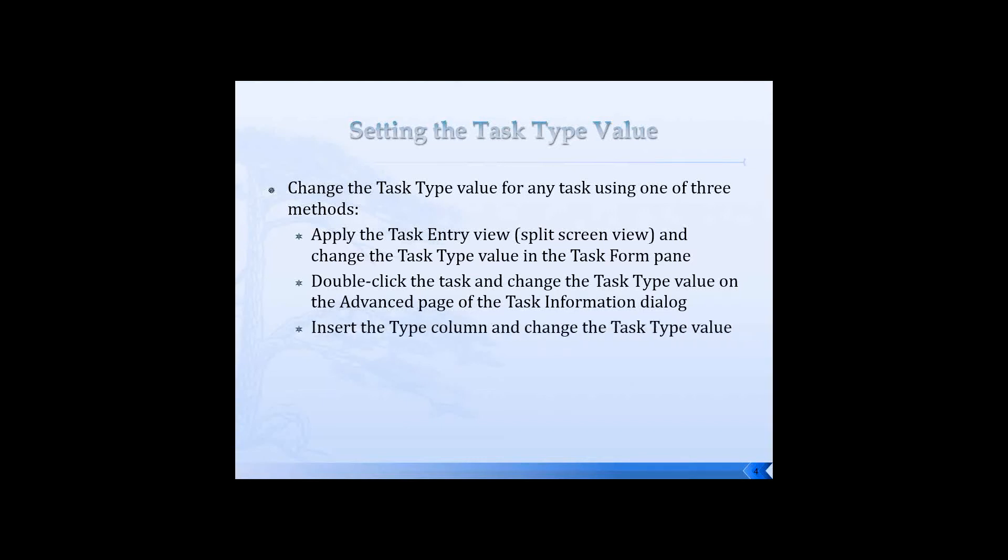A third method is to insert the column called type. Now everybody, I want you to jot this down if you didn't know this already. Notice the column is not called task type. So if you go hunting for task type, you're never going to find it. You look for the column called type and you insert it in any task view and then you can change the task type value.